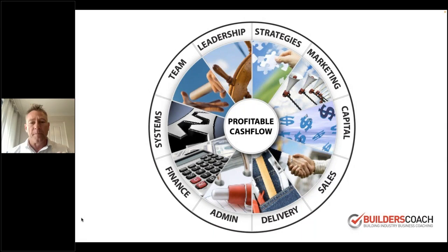The quick and easy way to fix your cash flow is to have a cash flow positive payment schedule. All right, so we've got an example where on a $1 million job you've got 14 payments. So I'm happy to send that through to you. If you want a copy of that, just email me again, kurt@builderscoach.com.au, or if you're a client of mine, on our next coaching call.